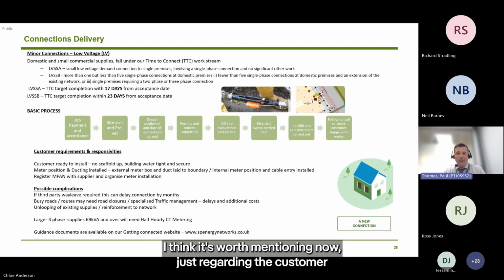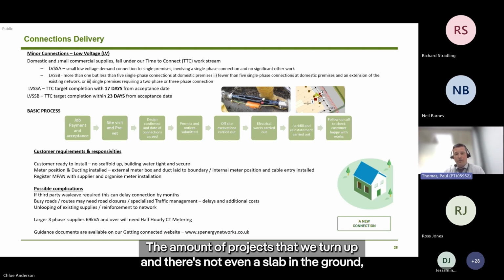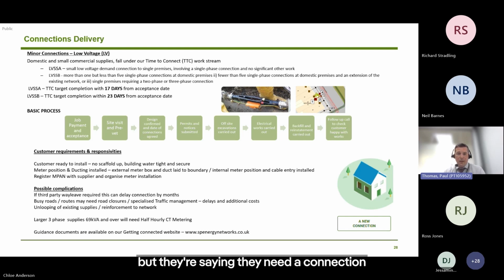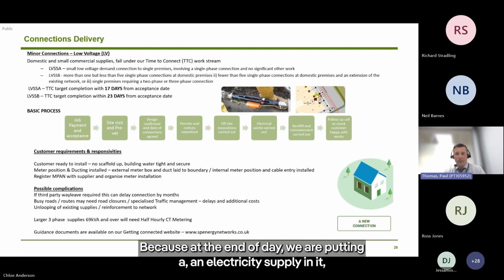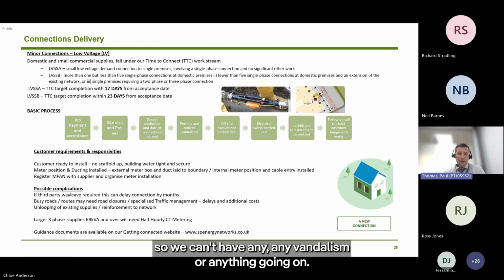I think it's worth mentioning now just regarding the customer requirements and responsibilities. The customer needs to be ready to be installed, so we don't need any scaffolding up. The building's watertight. You'd be surprised at the amount of projects where we turn up and there's not even a slab in the ground, but they're saying they need a connection. We need it to be watertight and secure, because at the end of the day we are putting an electricity supply in it, so we can't have any vandalism or anything going on.